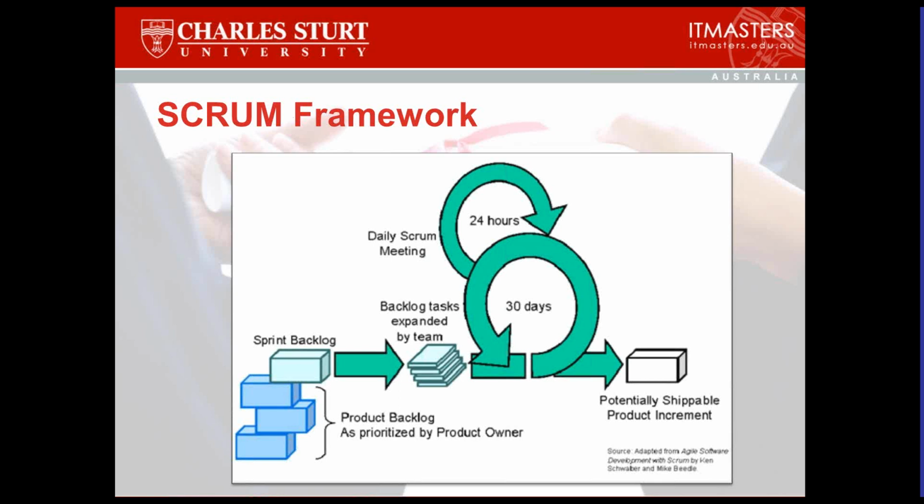If you look at it from a software design point of view, one of the features in the backlog might be the ability to report on last year's sales figures. Well, that's going to translate into database code, scripts for searching, and some GUI. This is all the technical coding stuff, but that's not how a sprint backlog is initially defined. But that's how the software coders need to work. So that understanding of what it's actually going to take is part of the sprint planning.